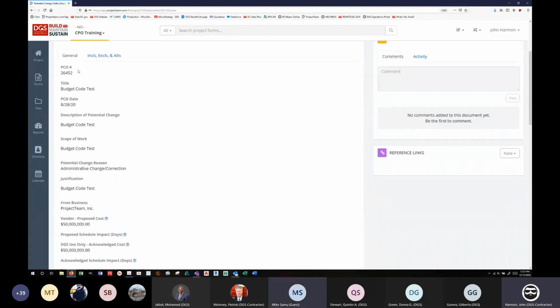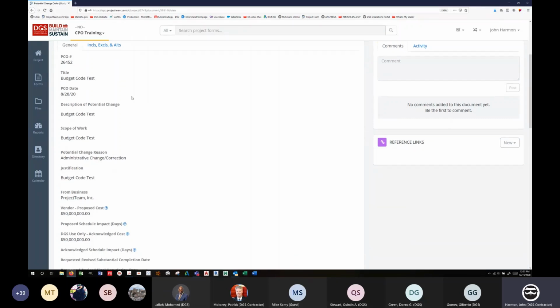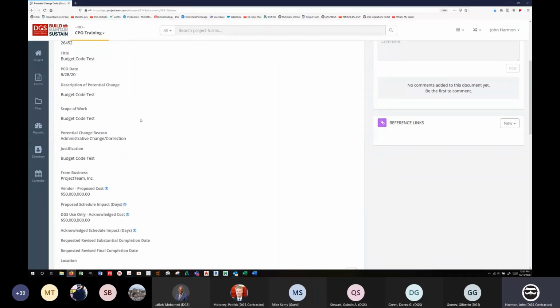Okay. So you're going to go through, you're going to read all the fields, make sure it has a title that applies to what it is. Again, the data integrity, the data quality. Don't just approve "time extension." That's not telling you anything. "Time extension due to unforeseen conditions," "time extension due to UST found on site," something like that makes sense. Just the words "time extension" doesn't.